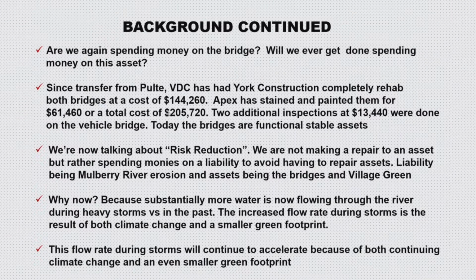That will bring up the question: are we again spending money on the bridge? We never get done spending money on that asset. I asked Warren to pull up what monies have been spent since Pulte left on the bridge. Since the transfer of the bridge from Pulte to us, York Construction completely rehabbed both bridges at a cost of $144,000 some change.